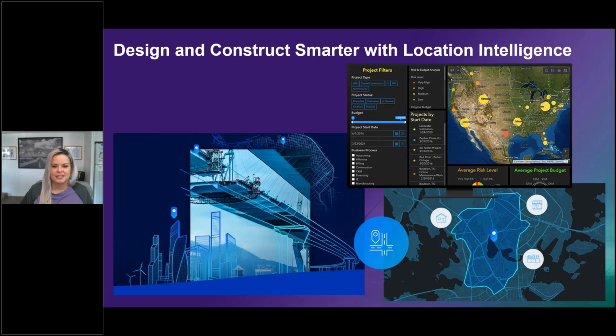So we can even monitor the construction of our project using drone imagery or perform periodic spot checks to understand where we are in our scheduling, if we're ahead or behind of schedule. We can see very detailed information about where the materials are laid out in the project site, where critical equipment is located, or even personnel closest to a problematic area that needs attention. Or even once the construction is complete, looking back to see how everything progressed over time to future replicate successful projects.